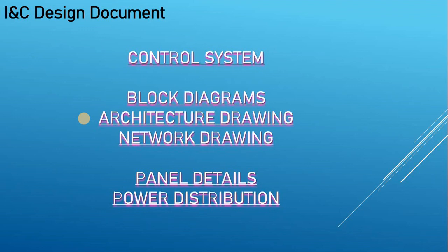In this case, you have to account for your man-hours spent reviewing those documents. If you receive, let's say, the panel details, and you assume you have 10 panels, each panel will have 5 drawings. That means 50 drawings. If you spend 2 hours on each, 2 by 50 means 100 hours. So you can see those hours accumulating and starting to get big, so you have to make sure you accounted for all this scope in your work.